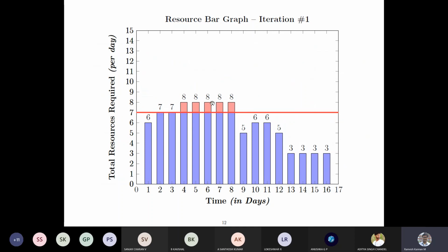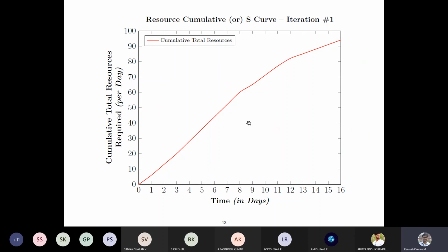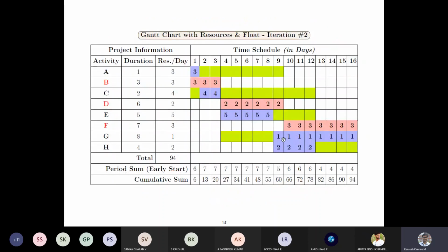So how do we make use of that? The same way. Similarly, you can push this one probably to this extreme based on this buffer. You cannot move arbitrarily. Say for example, the reason we moved 4 from here to this is that we have a buffer time. We cannot move a critical activity, but we can move the resources of the non-critical activities only within this buffer region, right?